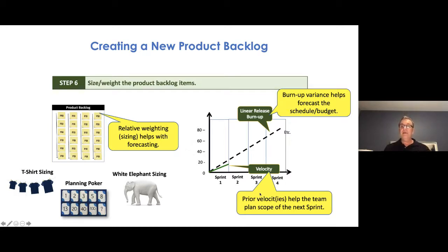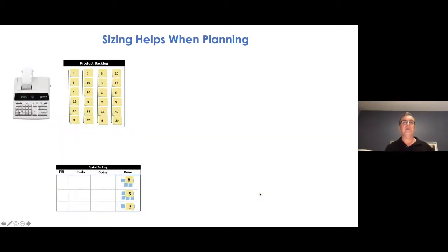Also, the team. So that helps from a product management standpoint in planning ahead and budget and schedule, but it also helps the team when I measure size in planning my next sprint. It's not that I can finish 3 PBIs, or product backlog items, per sprint. It's I can finish about 20 points worth of items per sprint, which might be 1 PBI in the next sprint, or it might be several PBIs. So it helps the team and it helps the release management as well.